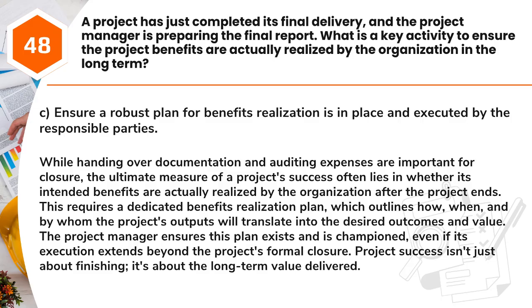This requires a dedicated benefits realization plan, which outlines how, when, and by whom the project's outputs will translate into the desired outcomes and value. The project manager ensures this plan exists and is championed, even if its execution extends beyond the project's formal closure. Project success isn't just about finishing, it's about the long-term value delivered.